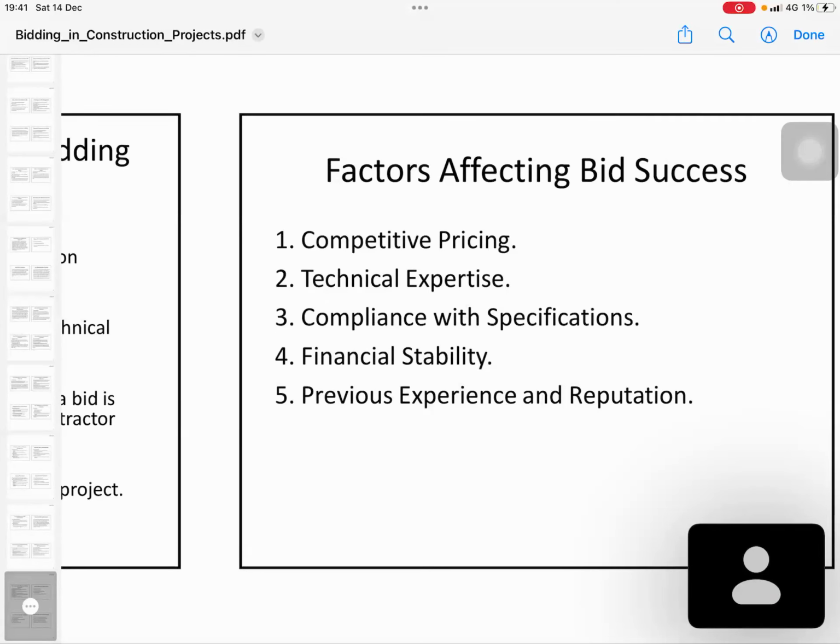Same thing as I said, in the Lotus Tower construction, we needed a tower contractor. So what we have done is, they subcontract. They make a joint venture with another contractor to do the Lotus Tower, because the main contractor does not have proper experience on that. Therefore, we requested them to give a tower design partner, a special contractor as design and contractor. And for the civil work also, we requested them to involve an experienced contractor in the same field.